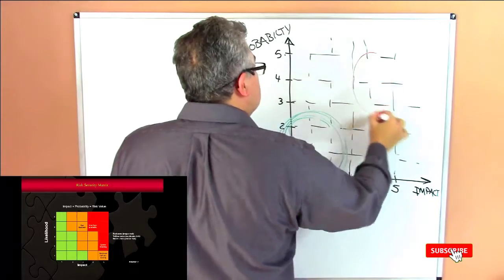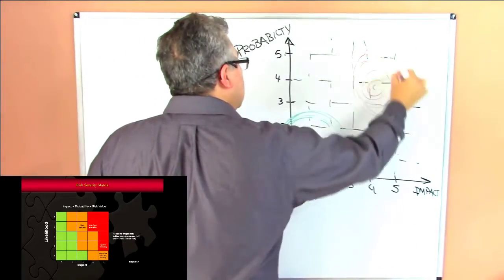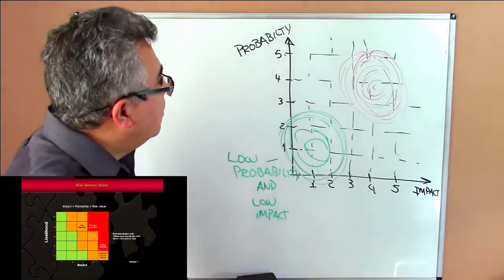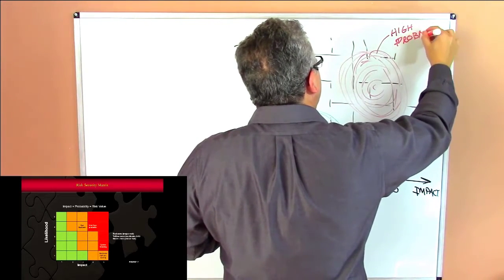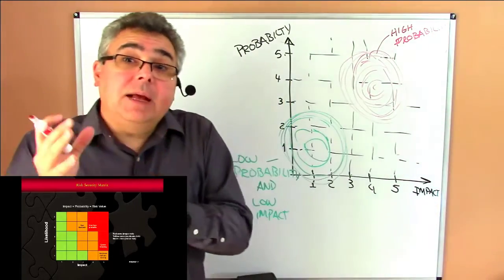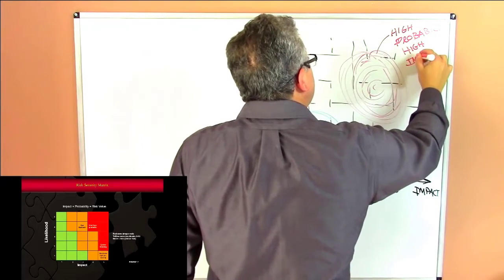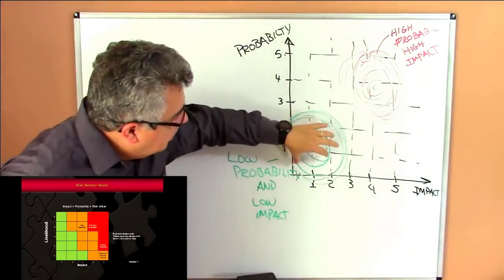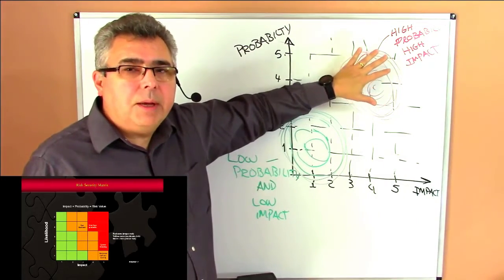On the other hand, we may have a region shaded in red in the upper right area, where we have high probability of occurring — meaning that event is more likely to occur — and if that thing that is more likely to occur actually happens, you also have a high impact. That risk matrix is an easy way to show the customer. Risks in the red area are the ones we need to focus on and pay attention to, because those are very critical.